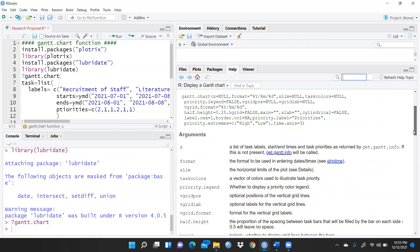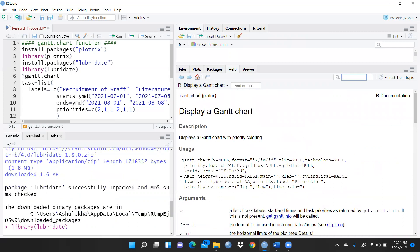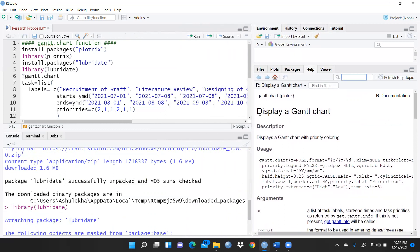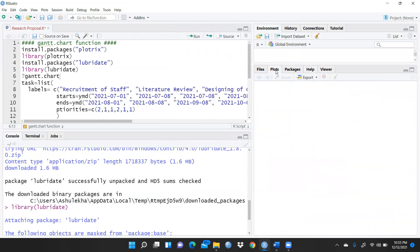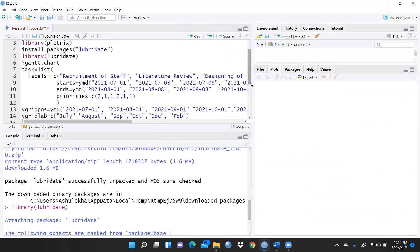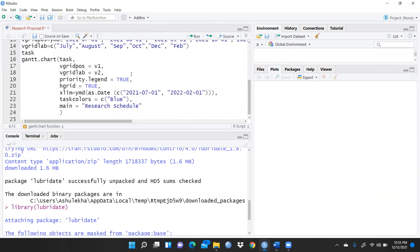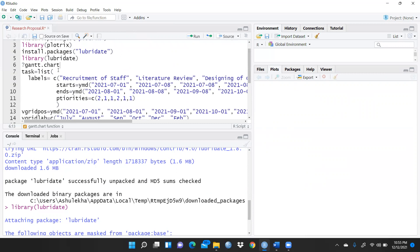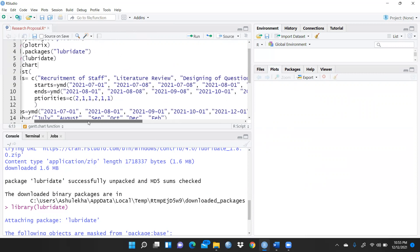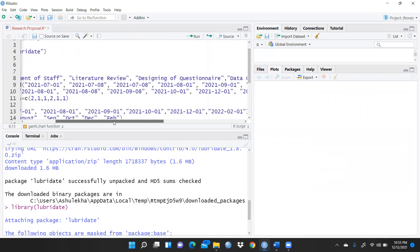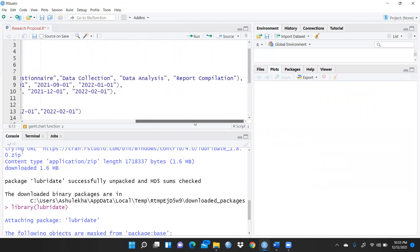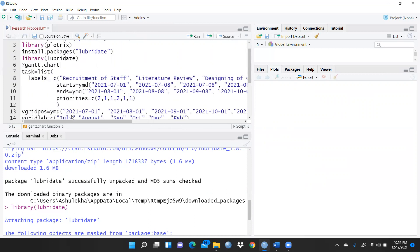Now let me show how to prepare the bar chart. First, I created a variable called task. Using task.list() with bracket open, under labels I define all the task characters: recruitment of staff, literature review, designing of the questionnaire, data collection, data analysis, and report compilation. Then for the start dates, ymd stands for year, month, day — that is the format we follow.